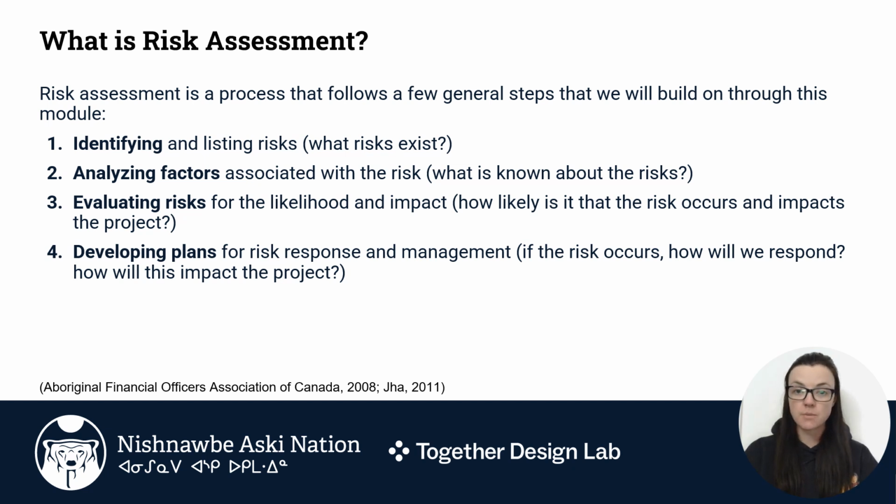What is known about the risks? The third, evaluating risks for the likelihood and impact. How likely is the risk to occur and how could this impact the project? And lastly, developing plans for risk response and management. If the risk does occur, how will we respond? How will this impact the project and the project team?